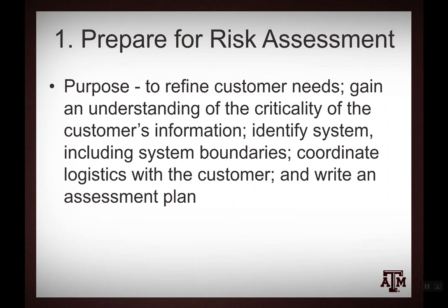So you prepare. You refine the customer's need. You're going to gain an understanding. You're going to coordinate logistics. You're going to write an assessment plan. You're going to do all those boring things that technical people don't like to do, right? You're going to be under a contract, or some kind of agreed upon statement of work, something where you know going in what is expected coming out. You don't want it open-ended, because your clients' or customers' expectations will continue to grow, as will the scope of your project.